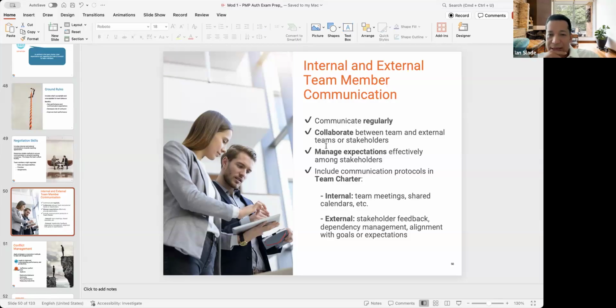Cool. I'll give you guys a second to write that down, because I've heard students say that comes up in the test. Push communication is something that you initiate, you're sending out. Pull communication is what the other team member or stakeholder has to retrieve themselves, right? Okay.